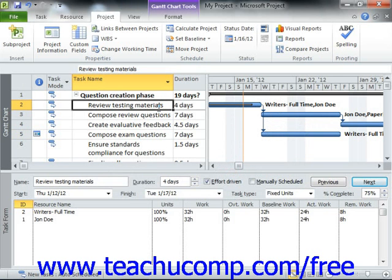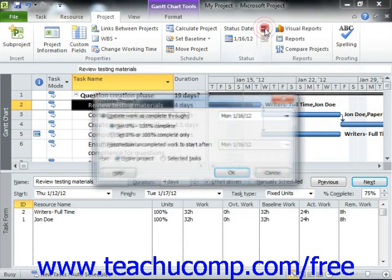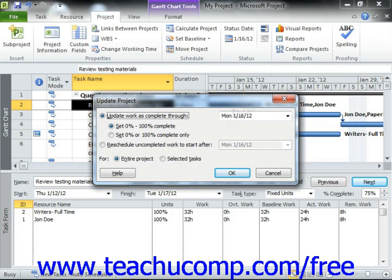Once the desired tasks have been selected, you can then open the Update Project dialog box again. This time, however, you would choose the Selected Tasks option button in the For section to update only the selected tasks as of the date that you choose. This allows you to then update some tasks individually as needed.